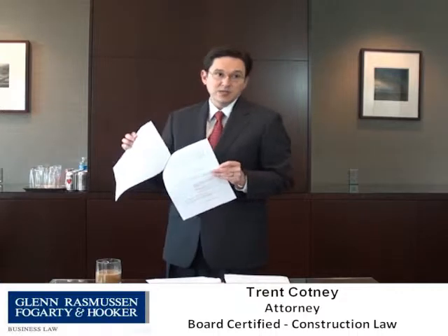Some practice pointers. When you are filling this out or assisting, remember, the owner must sign this. Okay, do not sign this yourself. If you're a contractor or a subcontractor, do not sign the notice of commencement, because there's a sworn statement there that says that the owner is attesting to all the facts that are contained in this document. You don't want to be personally liable for that.